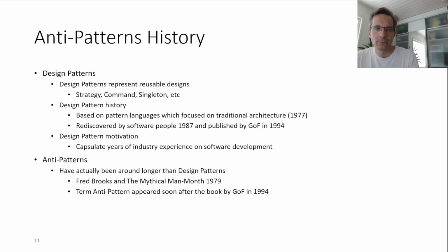So if you have 5 people, you are late, you are working hard, and you add 5 more people to the project, now these 5 people don't know anything about the project. They are educated software engineers, but they don't know anything about what's going on. So the current developers in the project need to start onboarding and educating the 5 people that come into the project, explaining how they work, the relationship with the customer, the requirements, where the testing is, what libraries we are using, and so on.